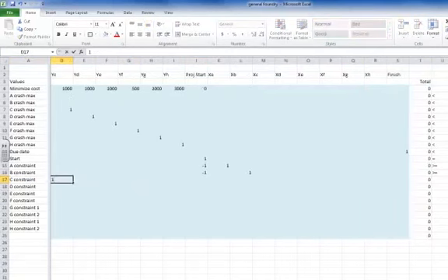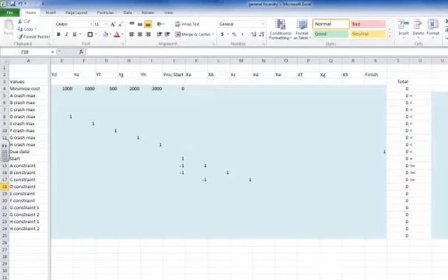C constraint, 1. In this case, my formula is going to indicate xa as a predecessor, and so I'm going to have a -1 for xa and a +1 for task C, greater than or equal to 2.